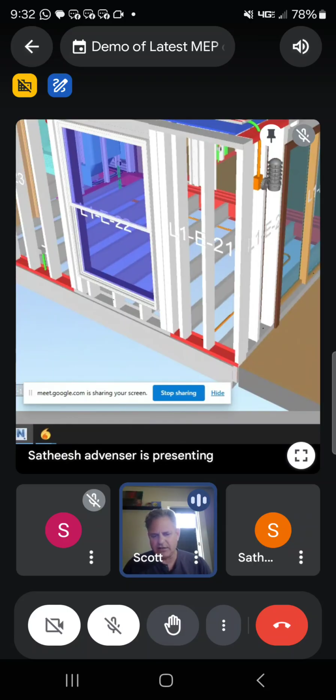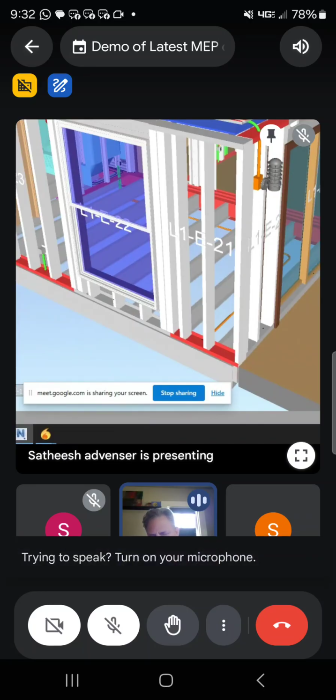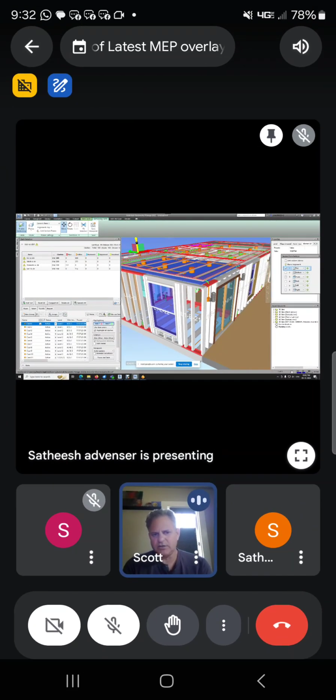But when it goes to the guys out in the field, or the guys in the warehouse, we want them to be able to cut. We'll have a bulk order, and then we'll have a cut list, and there'll be two guys, one guy cutting all this stuff up. And it goes the same for electrical. When we start cutting wires, we start cutting conduit, we start doing all this.